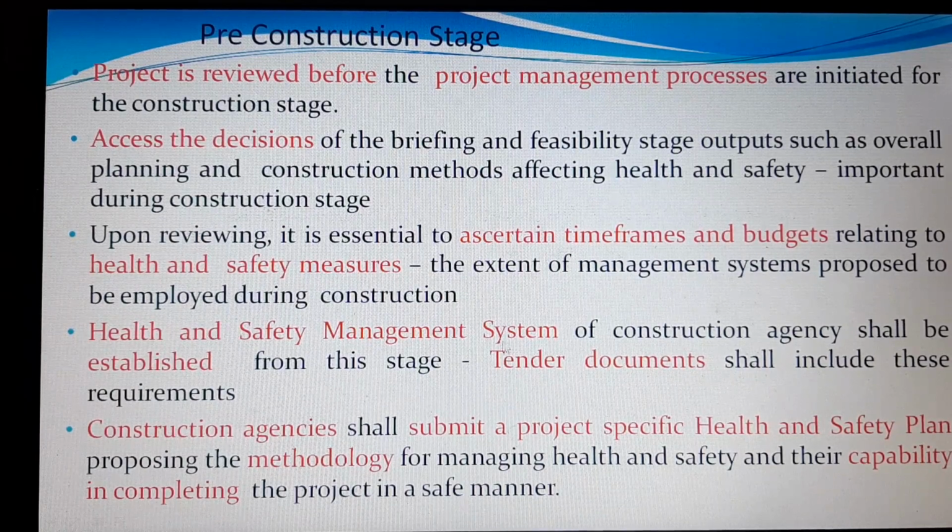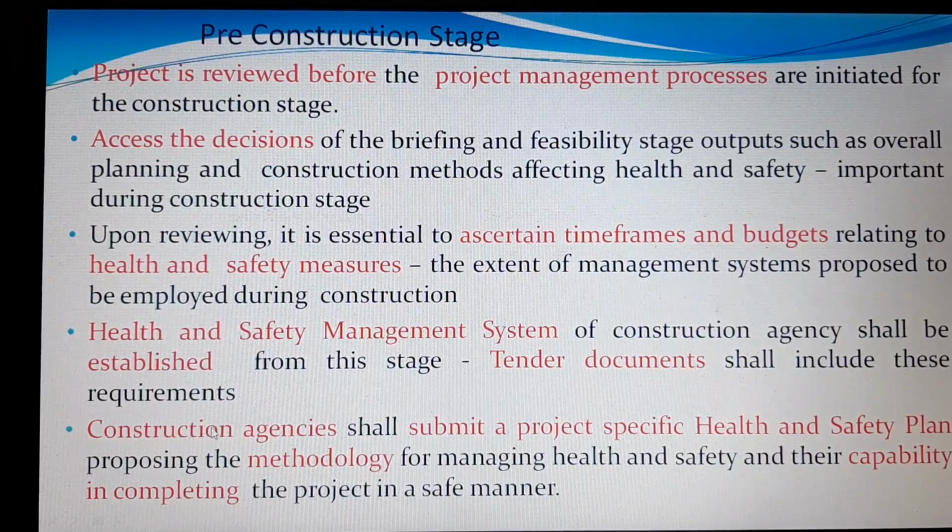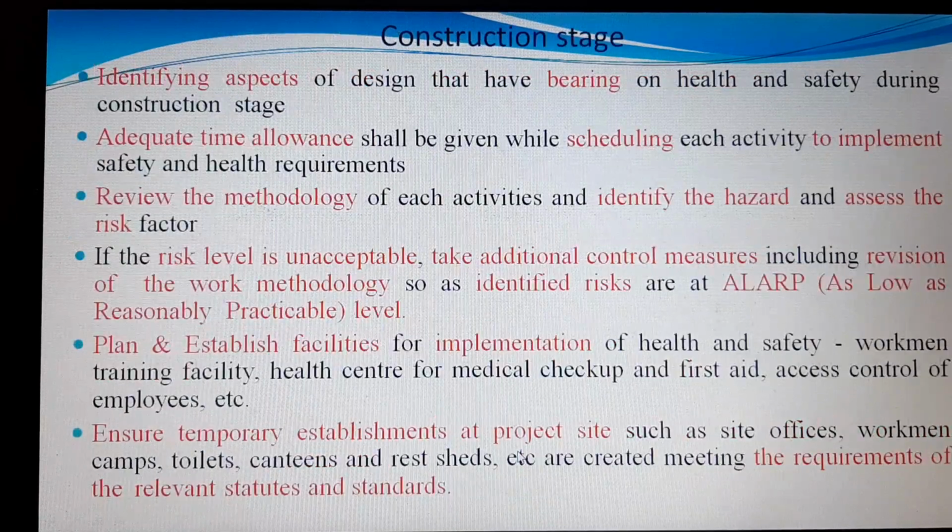The health and safety management system of the construction agency shall be established from the very first stage itself, and all our tender documents should have some amount kept aside for these safety and management systems. Construction agencies should submit the project-specific health and safety plan, and propose the methodology of how they are going to do it and how competent they are to execute the project in a safe manner.